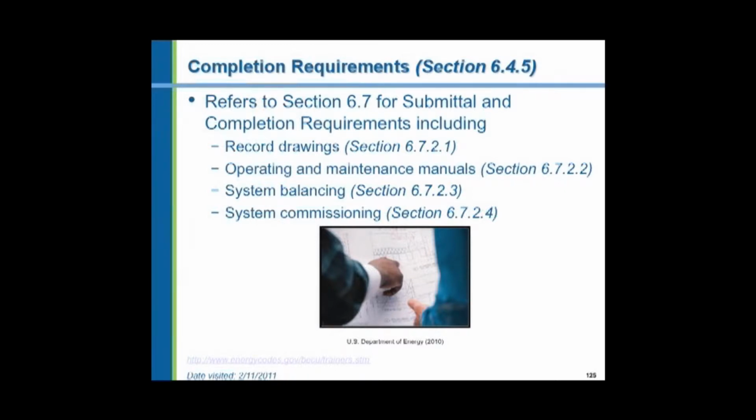And as I mentioned, 3 copies I suggest, because if you give them only 1 copy, most private owners don't know what to do with it. They will lose it immediately. So I would suggest that 1 copy be retained by the engineer, 1 copy given to the owner, and 1 copy given to the maintenance company. Now it may be in-house maintenance for a large owner, or it may be contracted maintenance. And that should stay with whichever maintenance company gets the contract.